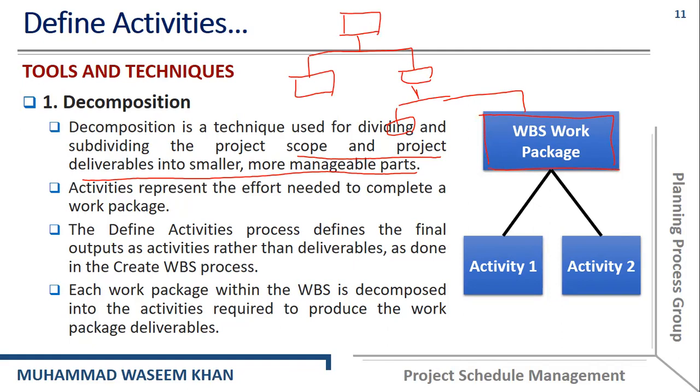The define activities process defines the final outputs as activities rather than deliverables, as done in the create work breakdown structure process. So each work package within the work breakdown structure is decomposed into the activities that you can see on the right side of your screen to produce the work package deliverables.